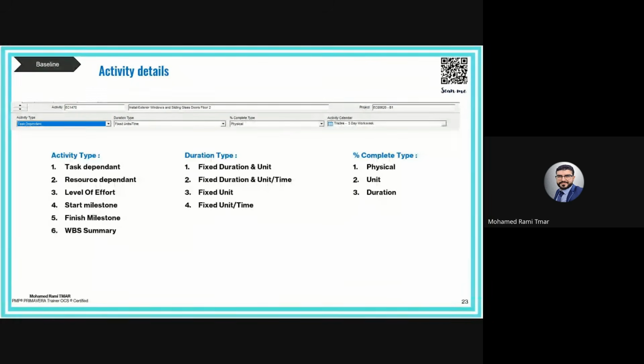Okay, and this is the real example: project manager, project control, supervising team. We cannot assign them directly on the level of activities, but we assign them in this envelope or high level activity to manage their budget. Okay.